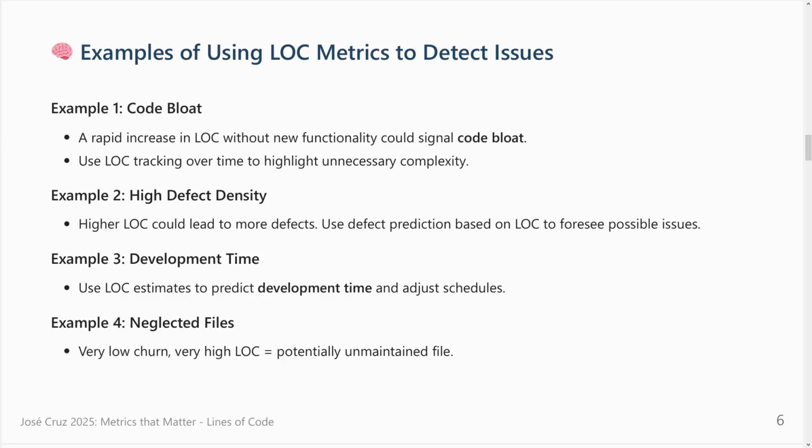Development time is another one, the same concept as the defects. You can guess how much time it takes. If you understand that a project like this takes 4,000 or 5,000 lines, you have a comparison. If you talk with project managers, they usually have templates and tricks like this to help them guess the time for projects, because they were in previous projects and they say, okay, this kind of feature with login, managing tables.